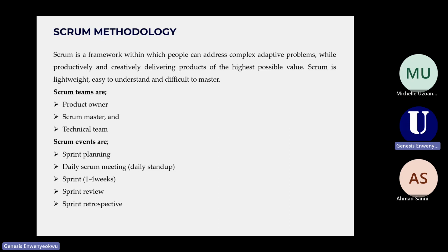So you'll be able to categorize all this or identify the different components of the e-commerce software, right? Now, in the first sprint, we said we want to build the home page. That home page we want to build in sprint 1. So that means in a period of 2 weeks, we want to be able to complete the home page for Amazon. At the end of the 2 weeks, the Scrum team should be able to show us the value of what they've done. That means you're able to show us a working home page for Amazon, right?